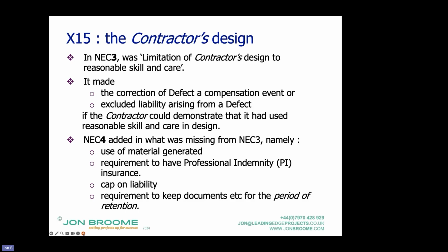So up to the defect state, the year after completion typically, what does this mean? It means that if the contractor goes back and corrects it, then it's not their liability, right? Because it's due to the design, which means that actually it's a compensation event, because if it wasn't a compensation event, the cost would fall on the contractor.